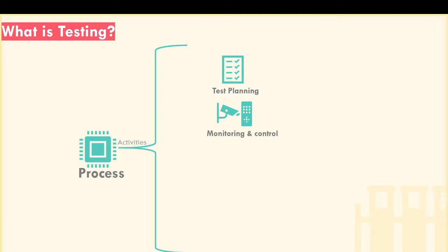If you are not able to do things in time, then you need to control it. Okay, if the test was originally intended to achieve a certain level of product risk coverage and it failed to do so, it requires additional tests to be written and executed.